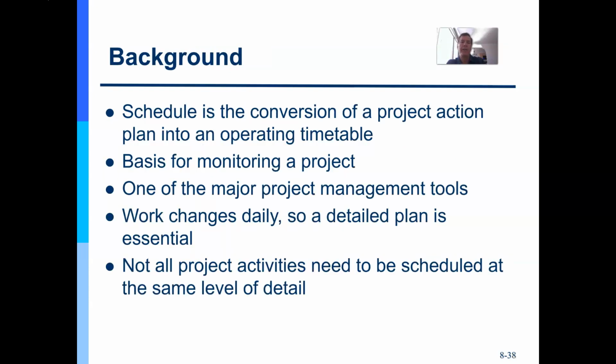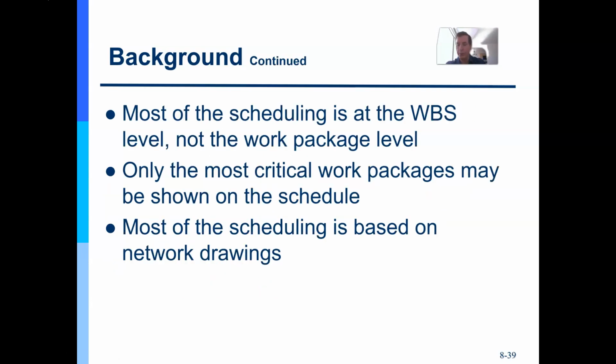Now, this is a conversation you're going to want to have. You're going to want to go out and get scope first, all your requirements, like from a business analyst, and you're going to make sure that the cost management comes in and your schedule folks, and you want to integrate all these together into that iron triangle, your three baselines: scope, schedule, and cost. They all must match. And you will spend the rest of your time as a project manager making trade-offs between scope, schedule, and cost baselines. And so those are the only three baselines, and you have to manage them.